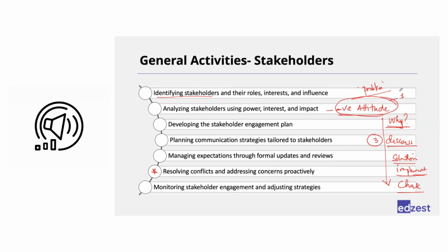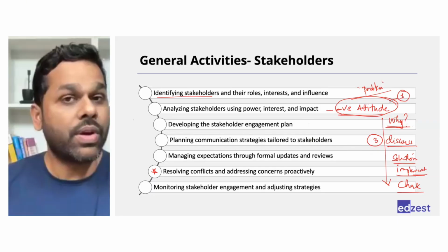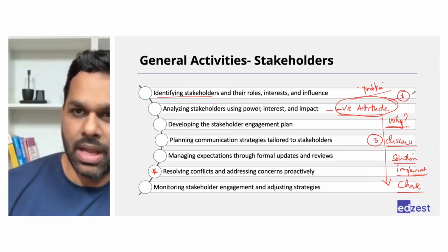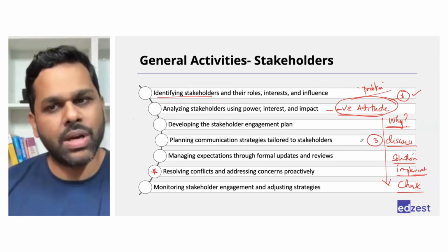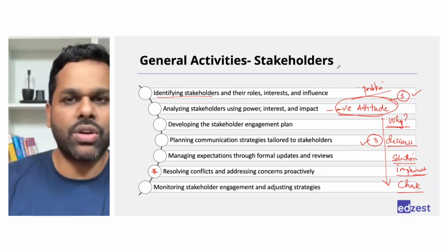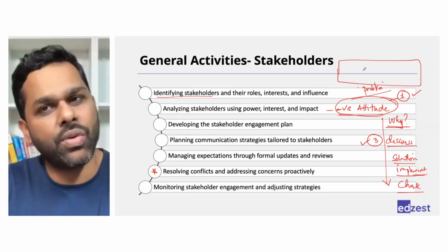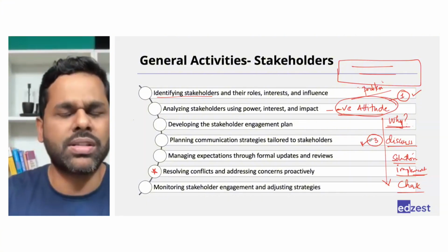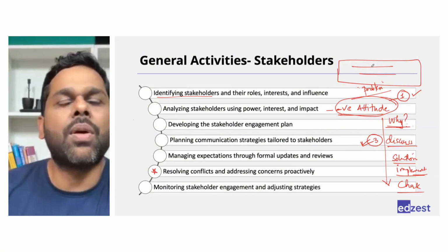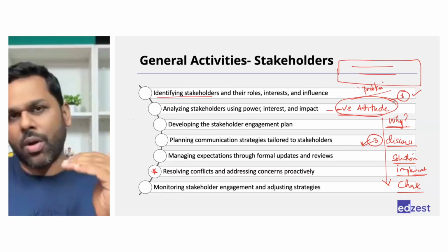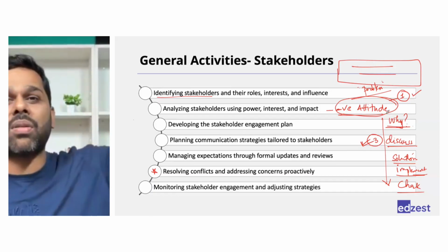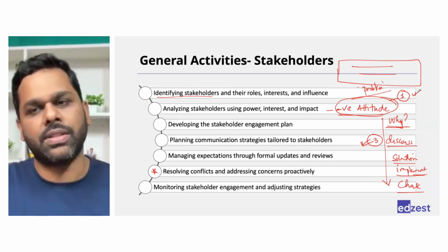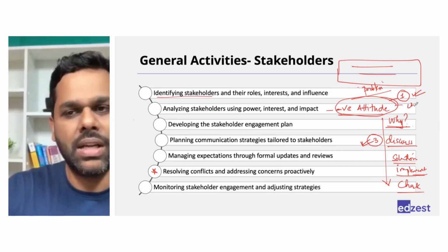Understanding the problem is your first point. So if the question is saying go ahead and discuss with that stakeholder, which means you're trying to understand the problem, you will do that first. Then you will discuss with the team. So it all depends on the situation. If the situation has already given you what the problem is, if they have already given you what the root cause is, then you will directly do the third step. But if they have only mentioned the problem but nothing in detail, and there is one option saying to discuss with the stakeholder to understand this problem in detail or to write down the problem statement, we'll always do the first thing first. So, first is always to understand the problem,